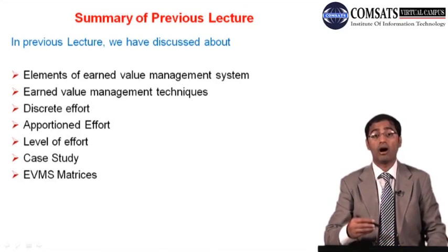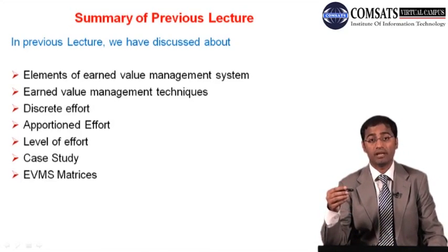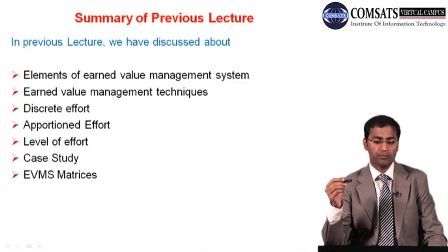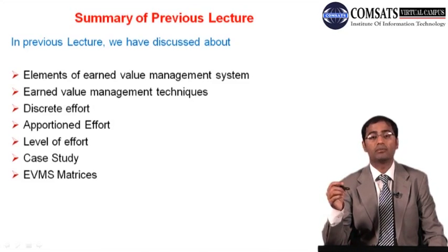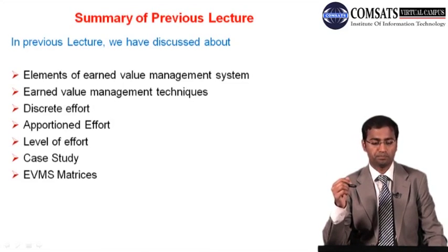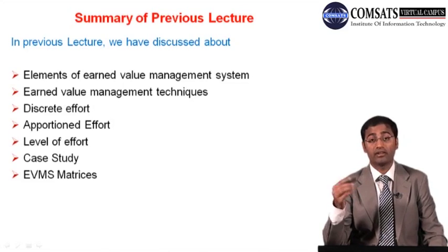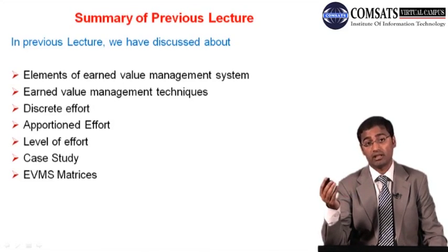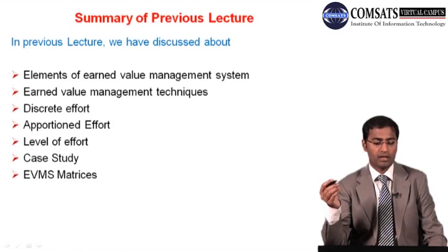Then we gave another shot at how to develop the performance measurement baseline. We also discussed in good detail the earned value management techniques and when to use them. There are 3 of them: discrete effort, proportioned effort, and level of effort. So for different types of work packages in a single project, you may use different techniques for earned value crediting.